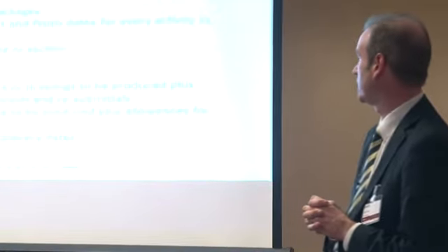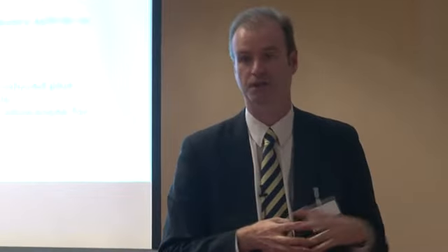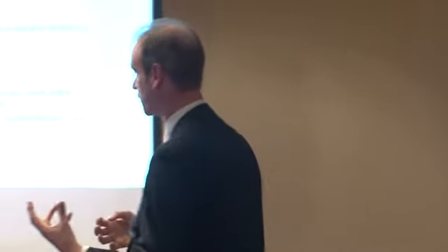And finally, on this slide, we have procurement periods and delivery dates. An obvious example might be structural steel work. So you might have typically, I don't know, an 8-week procurement period for some structural steel. You might have a 2-week delay to your information for producing steel drawings, but you need to recognise that there's an 8-week period on top of that which might affect your construction programme.